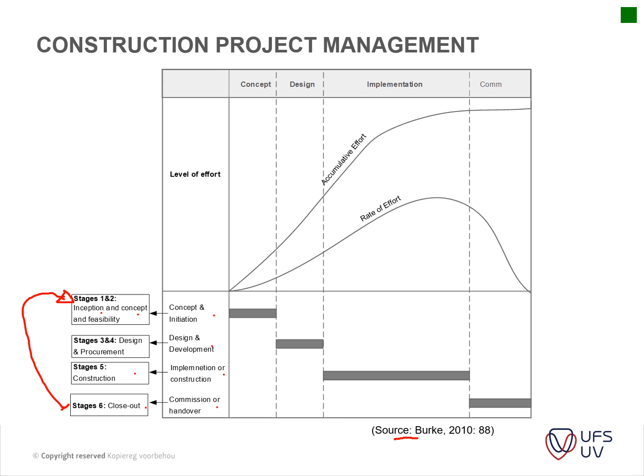So whenever you're doing tenders again, you would pull out a previous project and you will start there looking at possible rates. If you don't have any rates, you will source new rates, do your rate build-ups, etc. So this is more or less how it works, and this is universal for whether you're a professional engineer, architect, QS, or construction manager. Everyone within the South African construction industry uses these 6 stages to do their work.